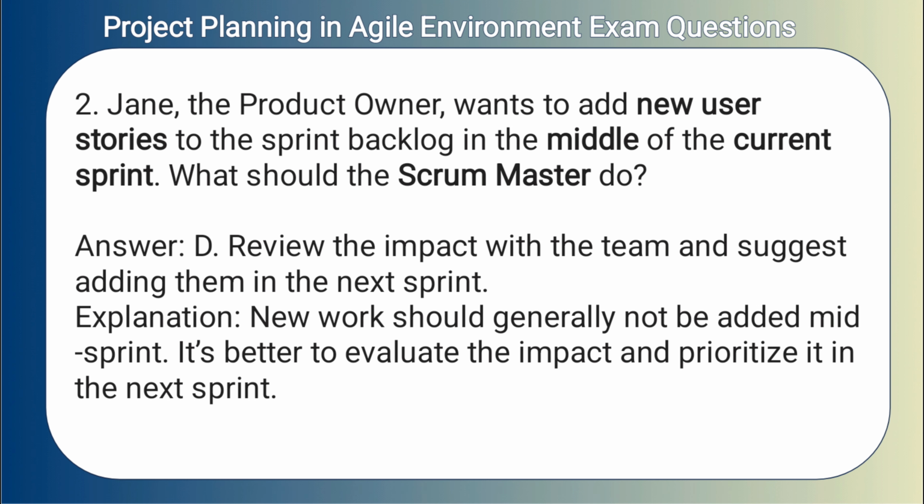Answer: D. Review the impact with the team and suggest adding them in the next sprint. Explanation: new work should generally not be added mid-sprint. It's better to evaluate the impact and prioritize it in the next sprint.